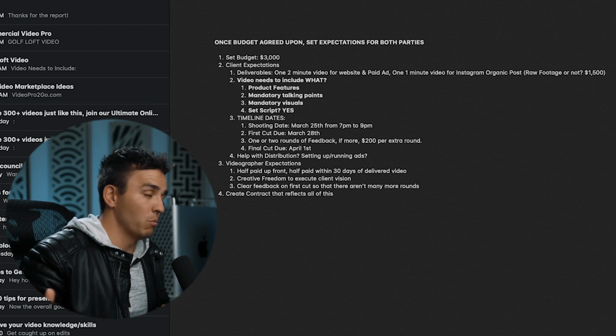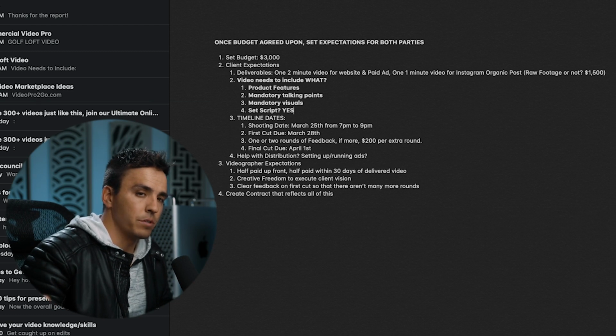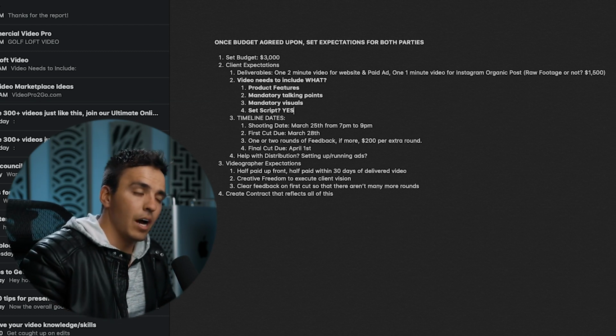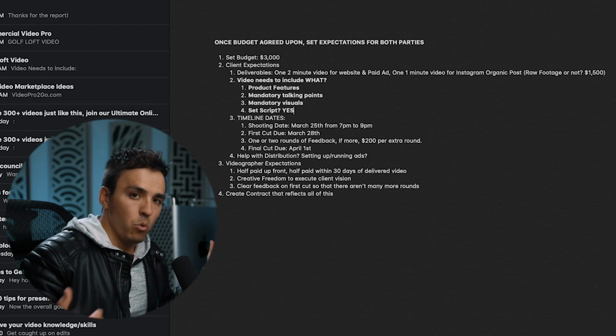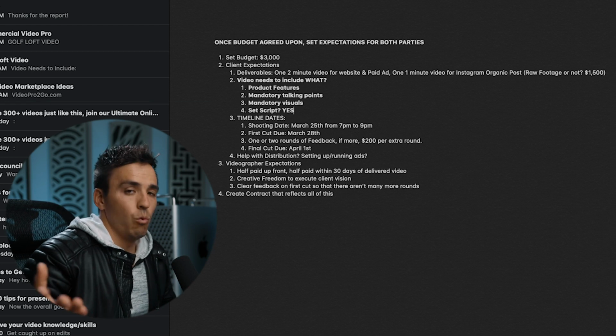And that's going to cost even more because basically we're now becoming a marketing agency and not just a video producer. And I recommend not getting caught in that trap of becoming the marketing agency. I always tell them, all right, I need you to send me a bullet point list of everything you expect in the video. If it's not on that list, it won't be in the video.